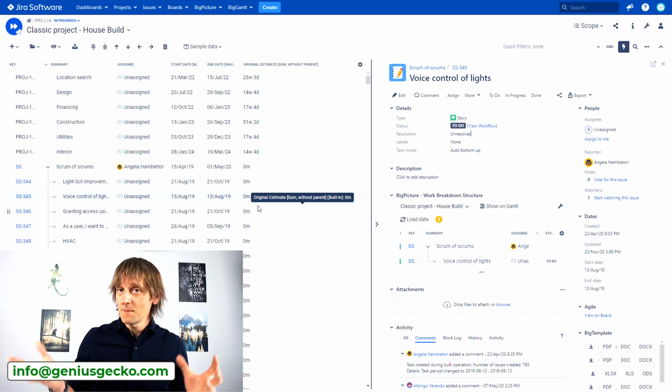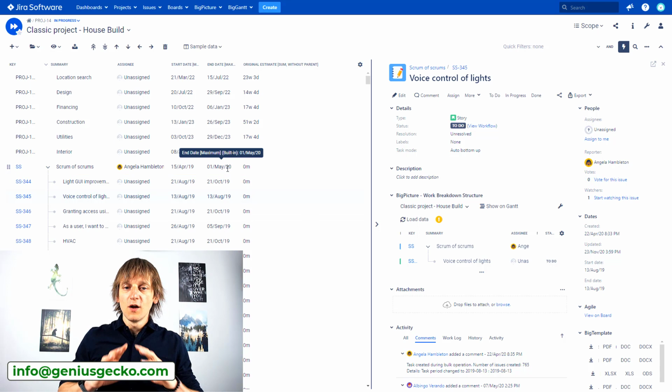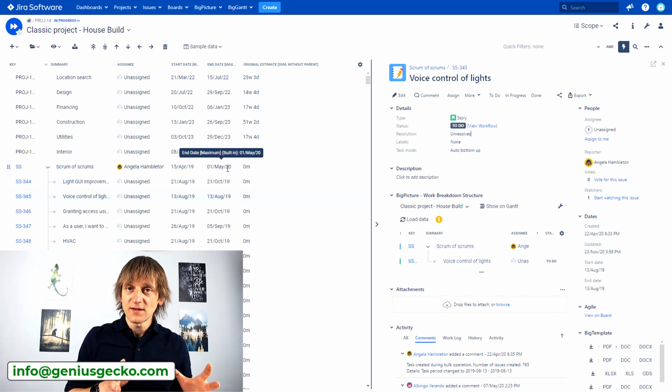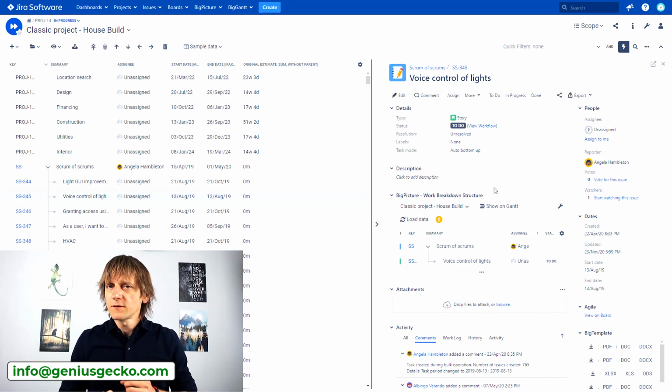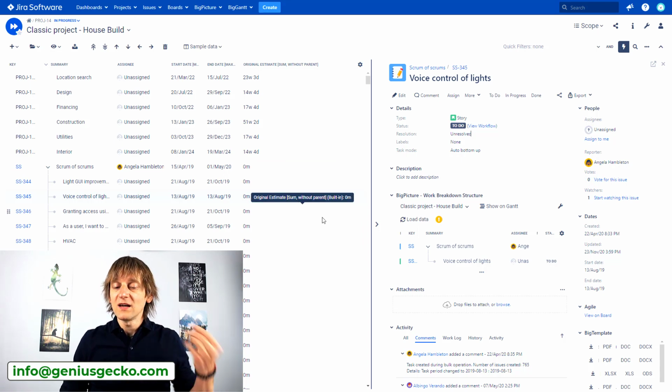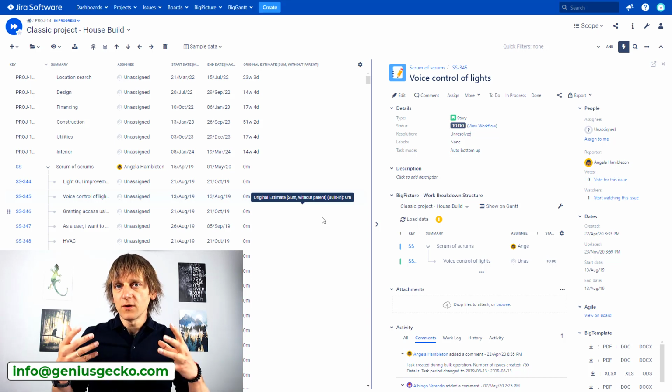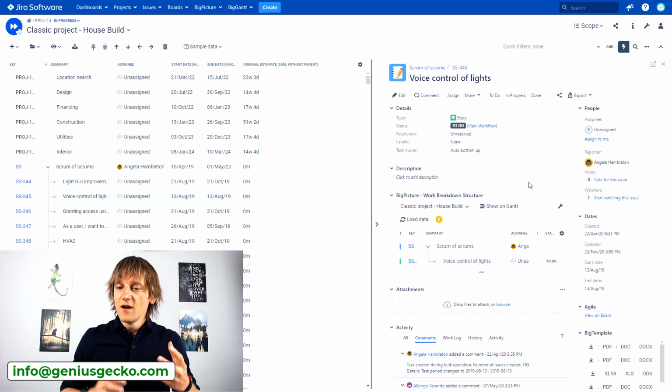And it's an amazing feature if you want to, for example, go through the list of issues that you have over here and update them in maybe several different ways. And again, of course, you could do this without this window, but not all the fields are actually inline editable in BigPicture. Most of them currently are, but still, for example, the original estimate, right? You can't edit the original estimate from the BigPicture view, but you can do it from here as long as the field is enabled on this view.